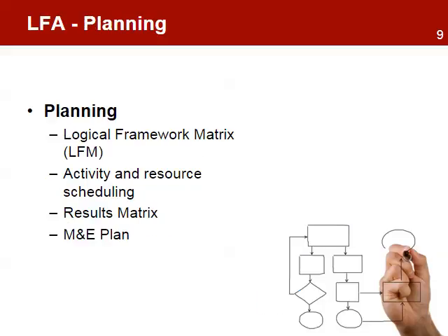The second part of the LFA approach deals with planning. This includes the development of the logical framework matrix, the scheduling of all project activities and resources, and development of the results matrix that will form the foundation for the monitoring and evaluation plan.